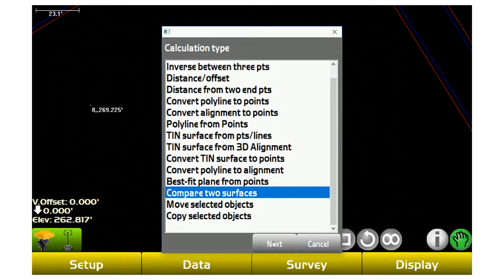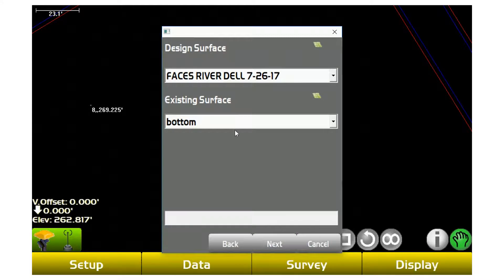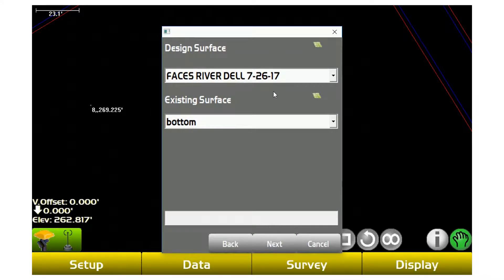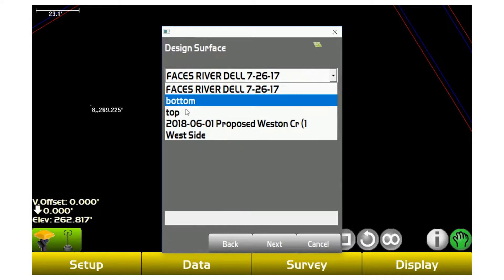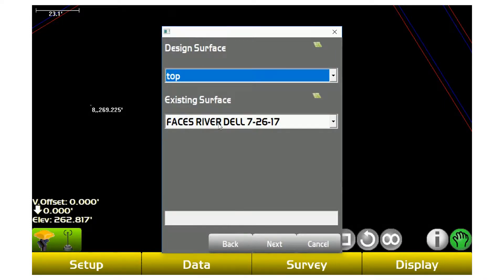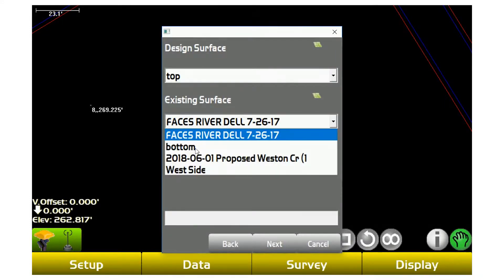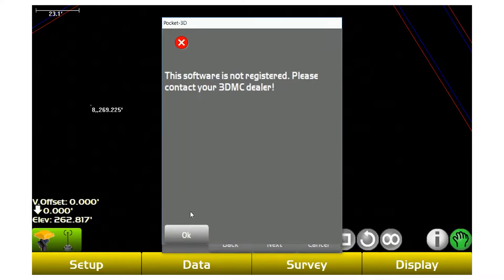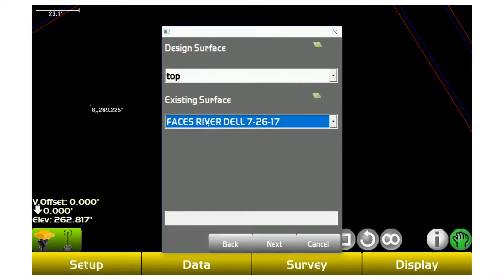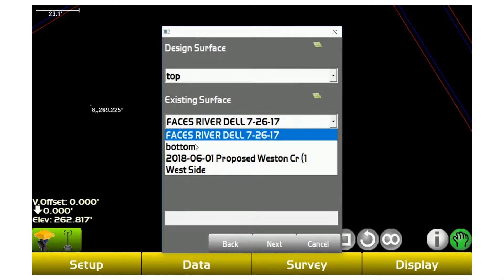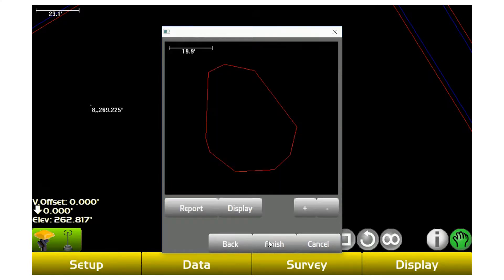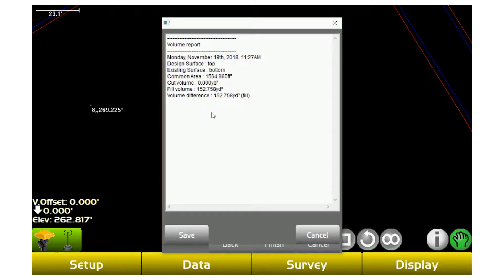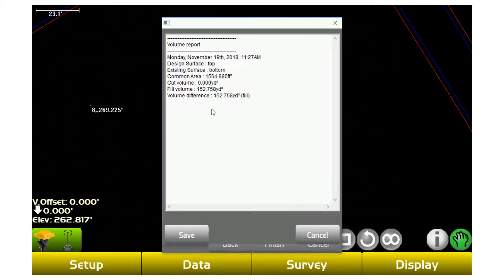If I compare those two surfaces down here, I can then tell it from here to the other one, read a report. What's going to tell me is my cut fill based off one to the other. So grading contractors can actually now get pretty good, tight quantities of what's been going on in that specific area.